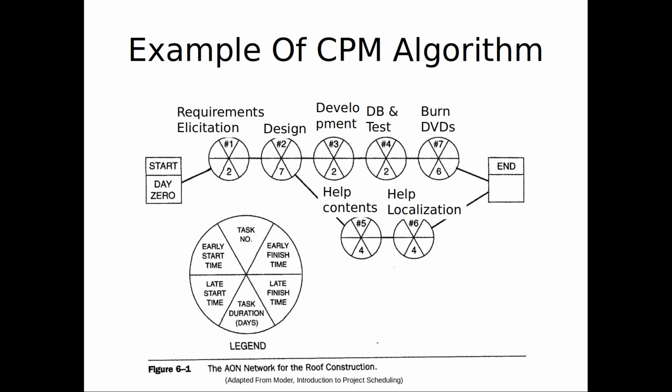Hearing no objections, I'll move on. Okay. And the earliest this can finish is 13. Where did I get the 13? Yeah, 9 plus 4, right? Do you see that? If this can't start before 9, there's no way we can finish before 9, given that it takes 4 days, yeah? Okay.